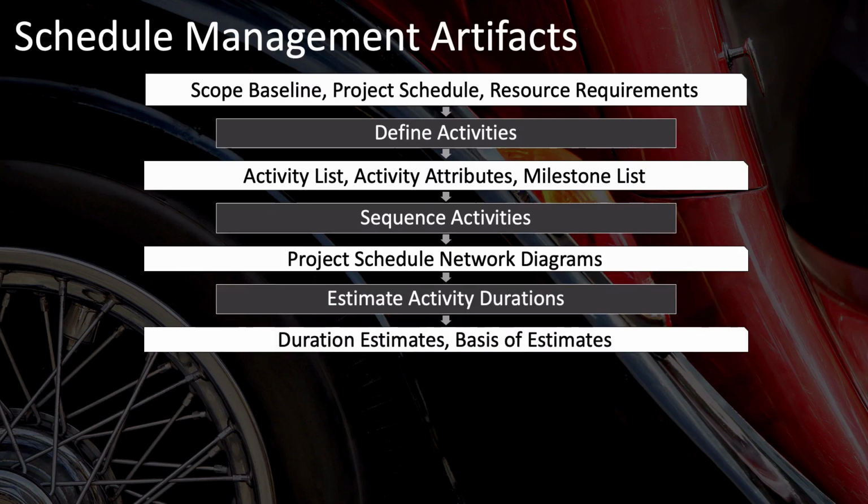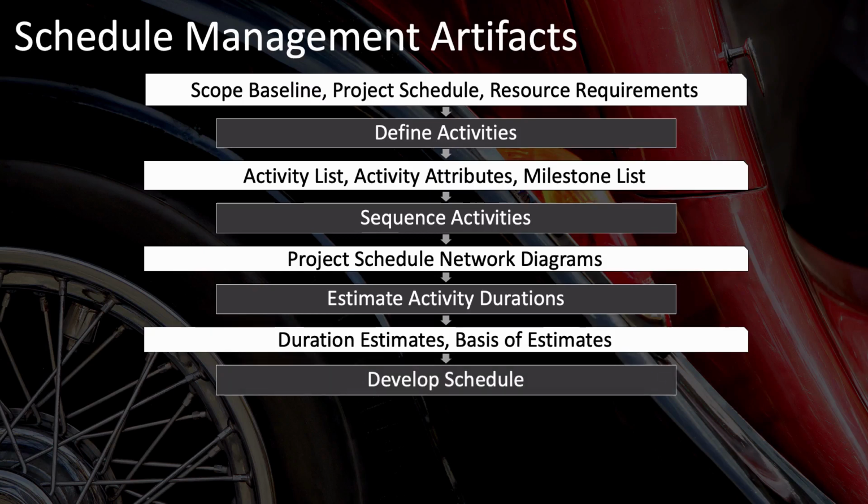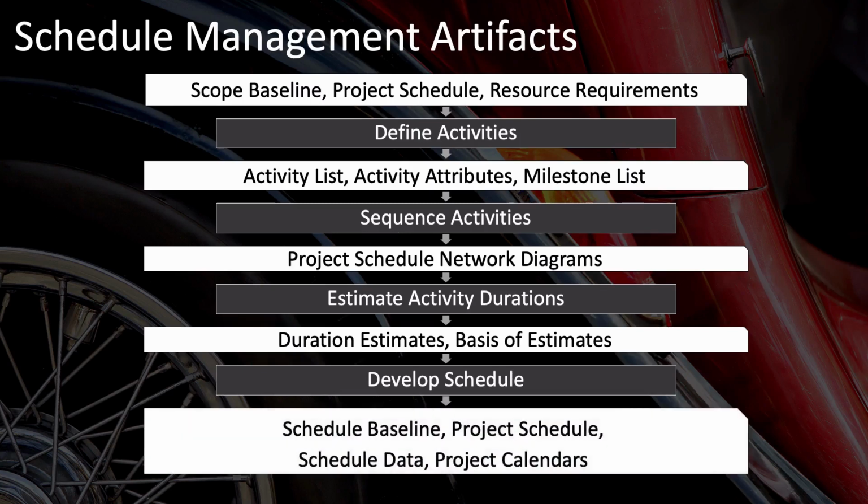Of course, these two go together, because every time you do an estimate, you need to also generate your basis of estimates. Once you have all of that, then you can develop your project schedule using develop schedule as your process. And its output will be your schedule baseline, your project schedule, your schedule data, and all of your project calendars.